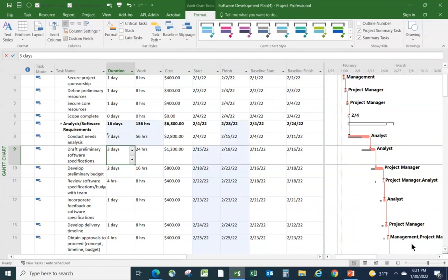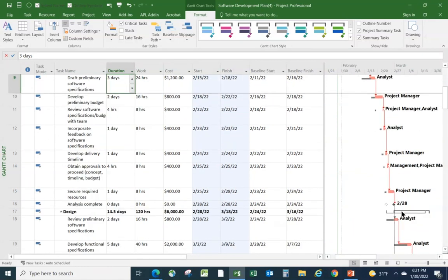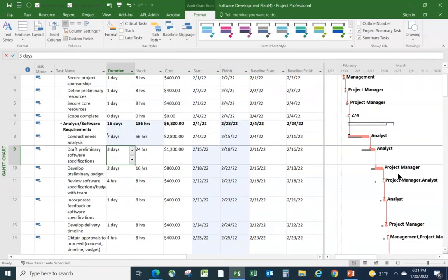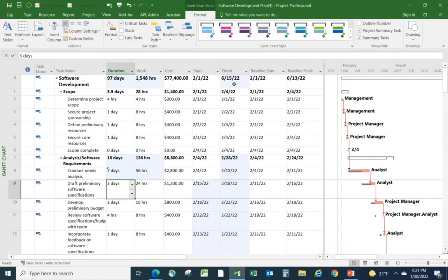Now, you probably just wouldn't roll over and say, okay, we'll just accept that then. What you would do is you would look to see further downstream to see if you can catch up anywhere, shaving some time off some of these other durations. Or you might go back to the boss and say, there's nothing I can do about it. We are now going to be a couple of days later, and then negotiate a new baseline or some combination of the two.